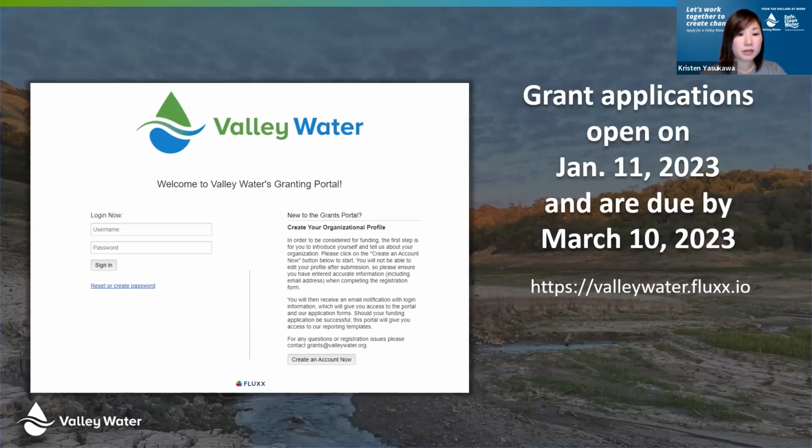So if it's Valley Water easement, you will need a Valley Water permit through our CPRU team. And if you are a grantee, so you've been awarded a Valley Water grant, then all the permit fees are waived for Valley Water. Okay, hope that answered the question. Awesome. Thank you, Kristen.